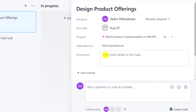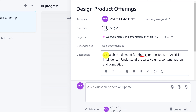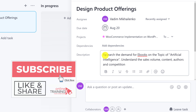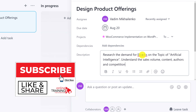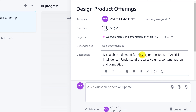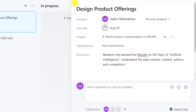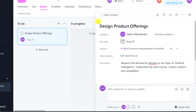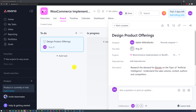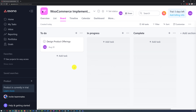The next field is dependency. Because this is the first task I am creating for my project, there are no dependencies — that's just the first one. Maybe for the next task I will be able to set up a dependency and make it dependent upon completion of this particular task. The next field is the description. I'm going to add the description — it shows what actually needs to be accomplished as part of this task: complete research based on the demand for e-books on the topic of artificial intelligence, understand the sales volume, the content offered, the authors who write about it, as well as the competition. Asana saves everything automatically — you don't even need to click the save button.